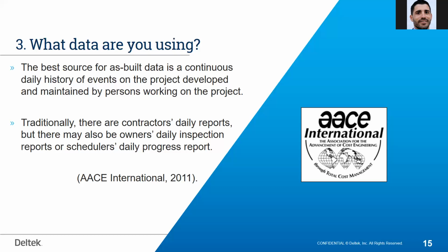So it will be very, very difficult if you don't have regular updates of your schedule to recreate these as-built schedules. So our suggestion here, and what the different organizations suggest, is that between the different parties in a program, you need to have regular updates that have been reviewed and approved on a regular basis. If there are any schedules that are not getting reviewed and are not, let's say, accepted by all the parties, then issues pile up, and then you have to use different sources to replicate what happened one or two years before.